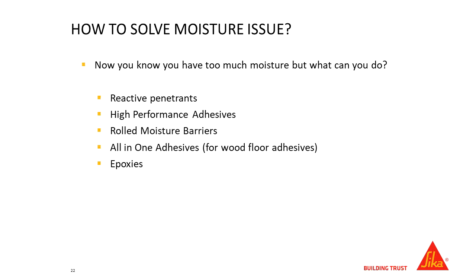Or you may go to the contractor and you say, listen, I have a non-compliant slab. It's emitting too much moisture. You need me in here next week. I'm telling you I cannot be in here. I'll void the warranty on my finished flooring. At that point now, the GC has a dilemma. Obviously, he can't push his schedule out. There's probably liquidated damages at the end of the job that he needs to concern himself with if he doesn't turn it over on the due date.